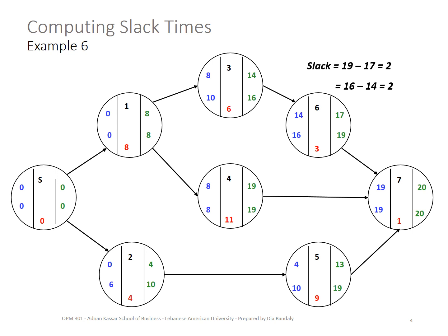For activity 6, remember we said the slack time, you find it by finding the difference between the early start and the late start, or early finish and the late finish. So we could see that for activity 6, this is 19, 17, so the slack is 2, which should be exactly the difference here, right? If this difference is other than the difference here, that means there was something wrong in your calculation.